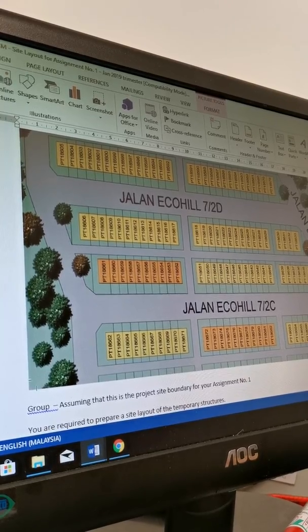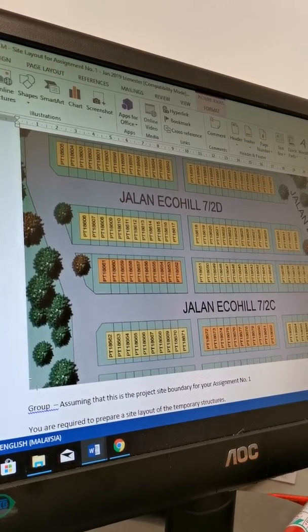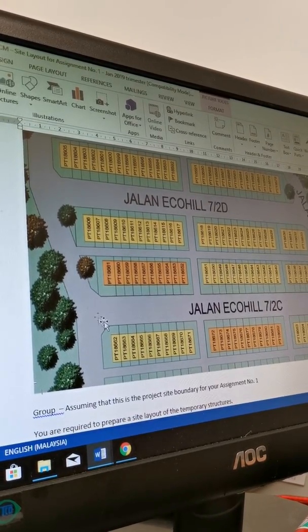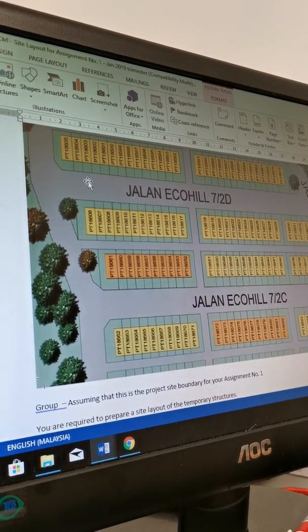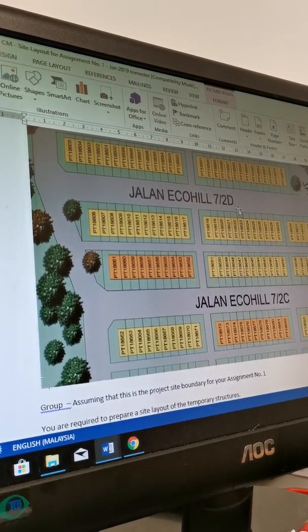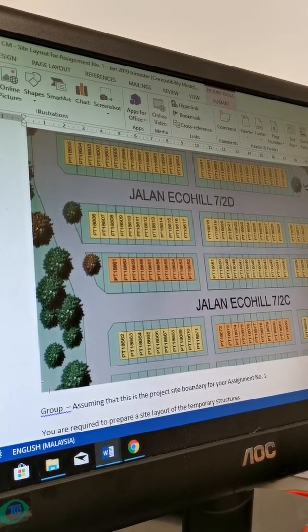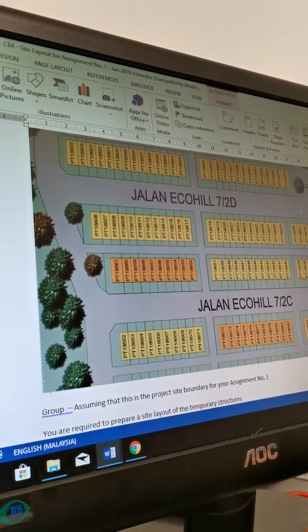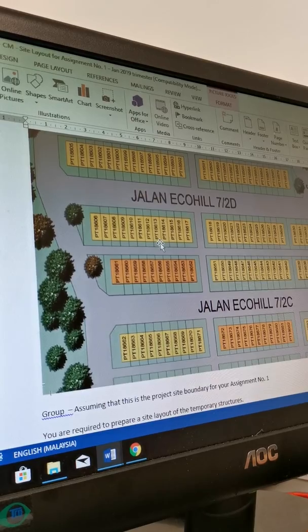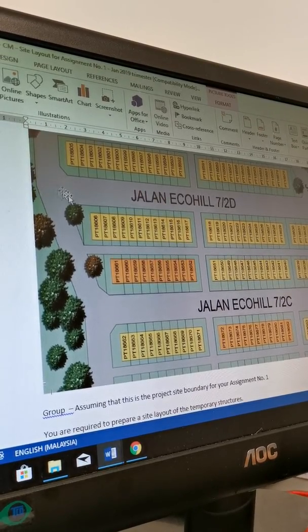Clear. So this is the end product. It's more towards the end purchaser. Or this is in future what you get. This thing you should be getting. See? Let's say here we put a temporary building over here, but on condition that you make sure your sewage does not run here. If your sewage runs here, you're finished. You have to shift your building. Clear.